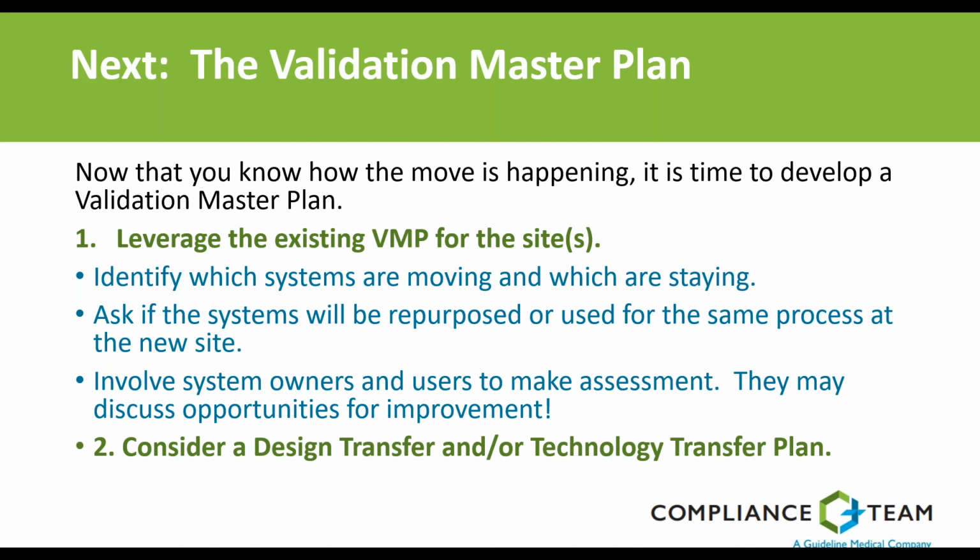So those are the situations you want to think about. Now, the other thing you want to think about is the design transfer or technology transfer plan. This is going to be a legal requirement if you're a medical device, because these types of moves affect your design and development, and of course, design control is a requirement for medical devices.